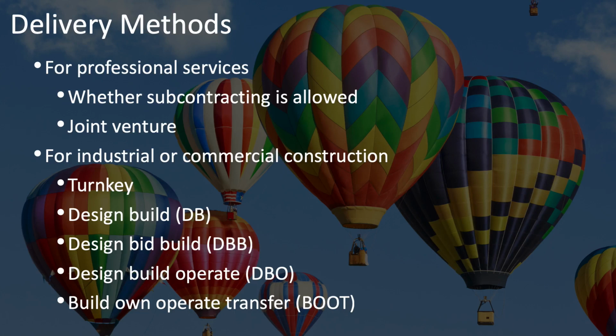I recently worked on a project for local state government, and we were working on acquiring and modifying a case management system. We contracted with a US-based company, so we were working within the same country. However, that US-based company, we found out later, was outsourcing much of their work to India. In the contract, it specified very clearly that all of the work had to be done within the state. Because this system used a lot of sensitive data, all of this data could only be made available within the state. It couldn't even cross state boundaries. So outsourcing this work to another country was a significant problem and a breach of contract.